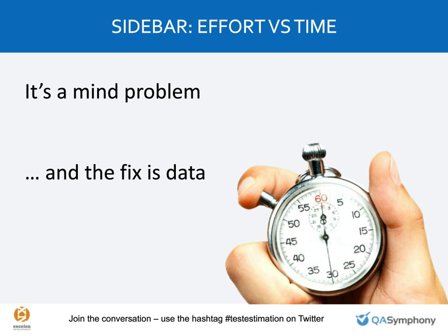So if that happens to you, get the data. Right? So you could say, I'm spending this much time fixing, I'm spending this much time on bugs, this much time on setup, and this much waiting. And then we can figure out whether the problem is the waiting or not. Having that data will help us explain why, wait a minute, you should be able to do this tomorrow. Why do you think it's going to take all week? Because we're going to need to wait for 3 more builds.